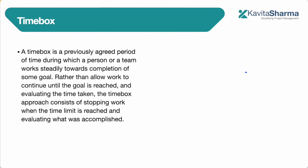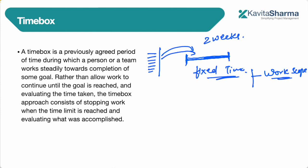Now, in case of Agile, we don't say this. What we say is, let's take a time box and the most used time box is two weeks. Let's take a fixed time of two weeks. Here is the scope which customer has expressed. But we don't estimate for how much time it's gonna take. We say this is our time box. These are fixed two weeks, fixed time. And then within this time, how much work can I do? So based on the fixed time, I estimate for the work or I estimate for the scope of the work to be done within these two weeks. So time is fixed. And in general, resources are also fixed.